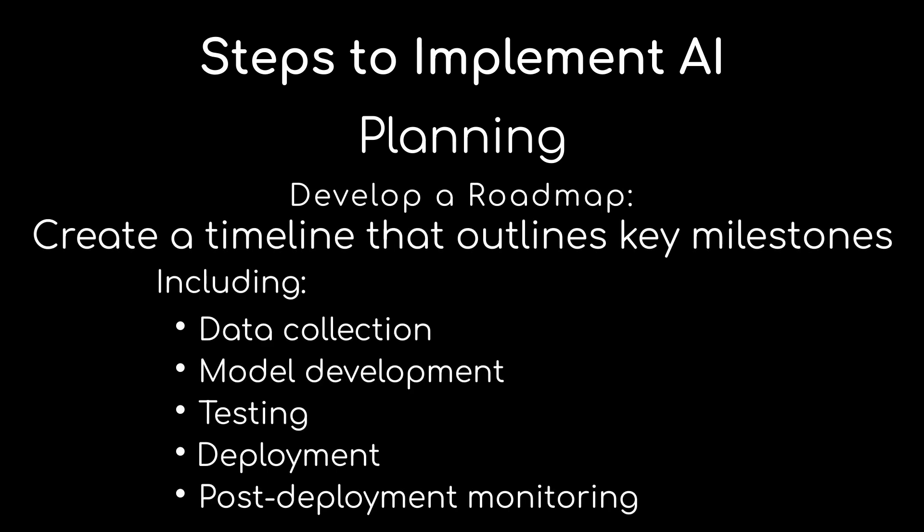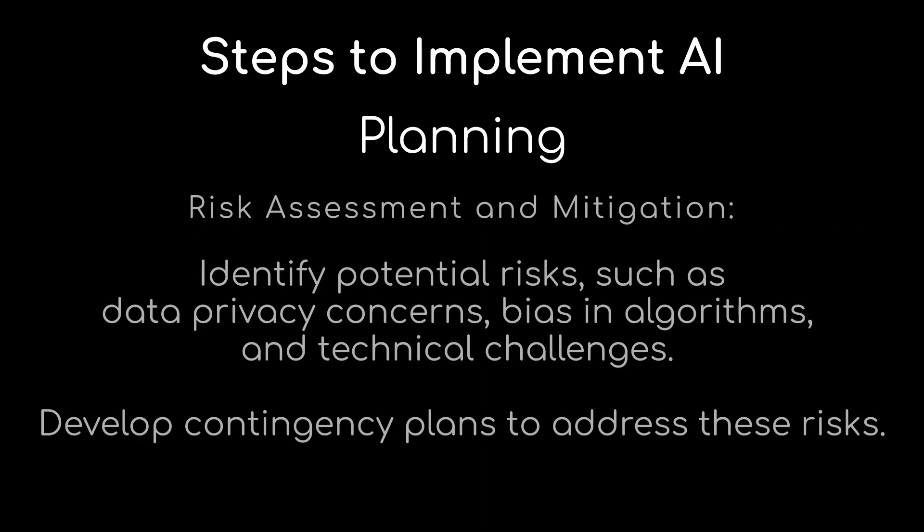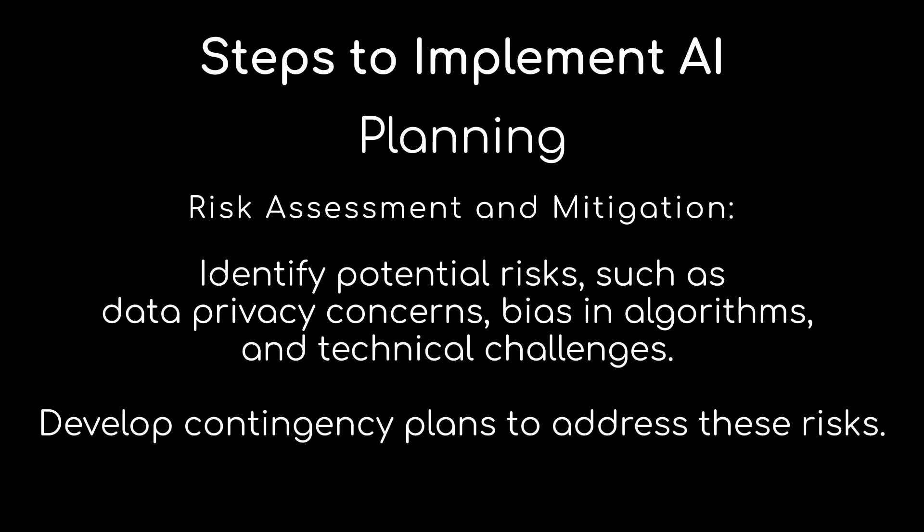Next, we're going to develop a roadmap — creating a timeline that outlines our key milestones, including data collection, model development, testing, deployment, and post-deployment monitoring. Then we're going to look at risk assessment and mitigation. This is a big one. We need to identify potential risks such as data privacy concerns, bias in algorithms, or technical challenges. We're going to develop a contingency plan to address those risks and make sure we're putting a safe product in front of our employees, our customers, wherever it's going.